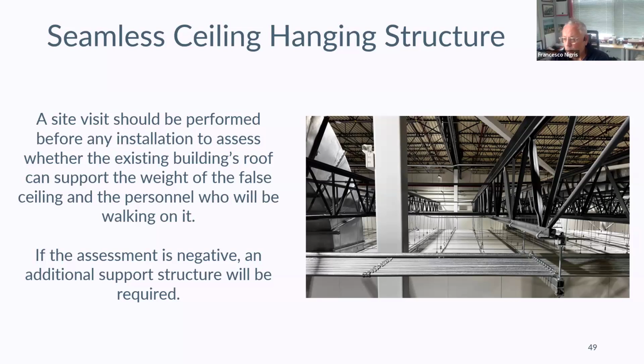And sometimes, not always, we receive the right answer. People don't know if we can hang the ceiling to the existing roof or not. People don't know the flexibility, the deflection rate of their ceiling in case of snow or weather. This information is important because it can change dramatically the price of a ceiling structure, if you need to add a mezzanine or not.